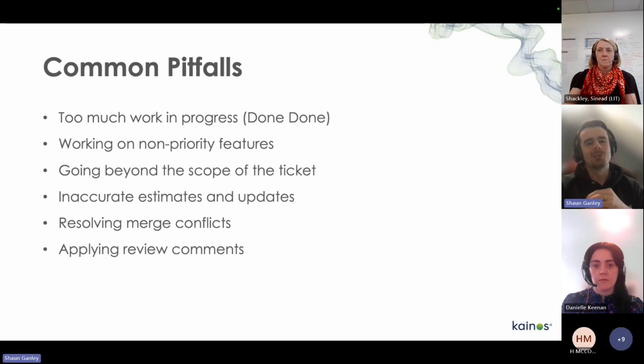That's where the term done comes from, because as software engineers, whenever we finish writing code, we tend to say something is done. But within the world of Agile, something isn't done until it's been tested, signed off by a product owner or a client, and moved into the done column. I'll talk about that when I share some of the resources you can use in a minute.